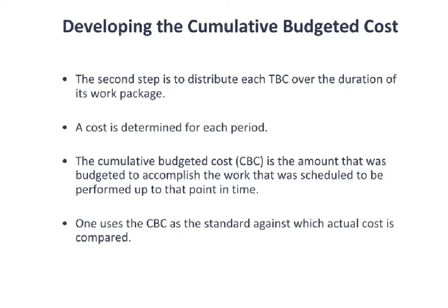So distributing across the work package, the allocated budget. I would encourage you also, it's not on this slide, but I would encourage you to be very cautious as to who is involved in helping you make those decisions. You need a person helping you distribute those funds that is knowledgeable of the actual work. If you're not the one that's going to be doing the actual work, you're probably not the right one to make those determinations. You need to be working with your team and working with those that will be executing the activities in the work package.